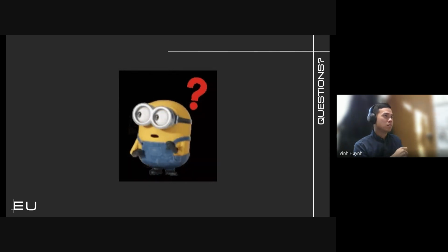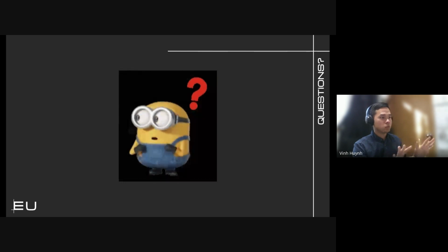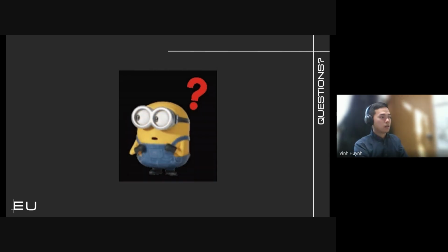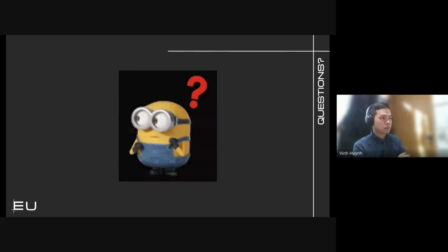Because once you launch it, whatever you do in terms of adding users, they don't link anymore until you finalize it. So if you have to manually add somebody midway through, you have to do it manually on both.